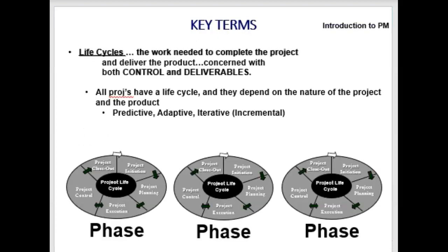So in terms of a go, no-go decision, you have these phases in the life cycle. I just picked 3 phases. You might have only 1 phase in your project life cycle. You might have 10, right? Based on your approach. And at the end of each, at the top left where it says project close or phase close in that case, you're going to do a gate, a go, no-go decision, a kill point, a determination.